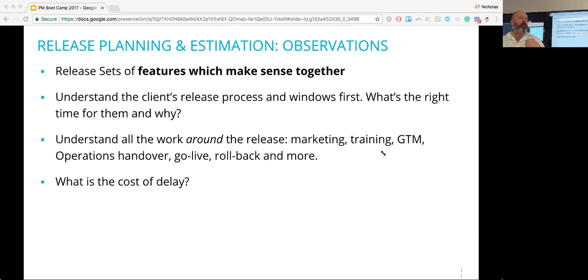Right? So cost of delay is something to think about when you're doing release planning, this long-range planning, because there are certain things that, because of hitting a regulatory deadline or something like that, have a very real cost to an organisation. Sometimes product owners will talk to you about a great cost of delay because it's a fantastic feature, and every day that we don't get it out there, sorry, that doesn't count. Cost of delay is like, what is the real cost? Why can't I do this work in a month for real? Why can't I do it three months later for real? What is the real cost of delaying that and doing this instead? And this is a conversation that's often missing.